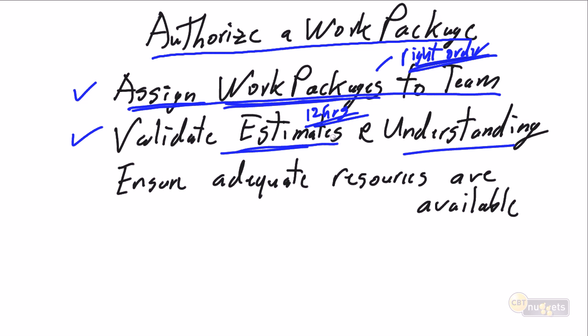And it may well be that the team member has overanalyzed, overassumed, is gold plating, is building more functionality than the task really deserved, and therefore, again, you can better manage their understanding of the work required and say, if I remove this and this and this, which is not within the expectations of what you're going to do in this task, what is your estimate going to be? Oh, with all of that removed, yeah, that really is a lot less work. Oh, I think I can get that done in 16 hours.